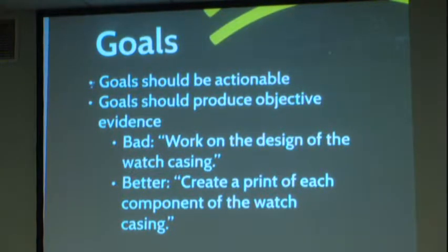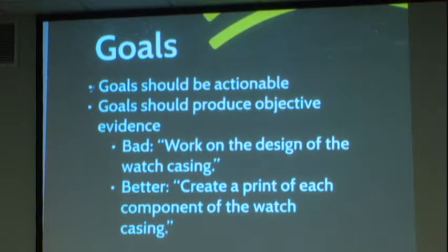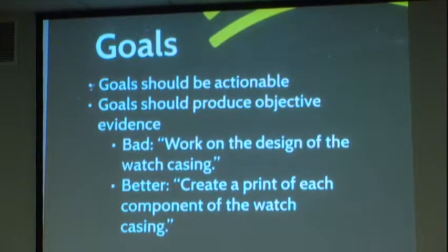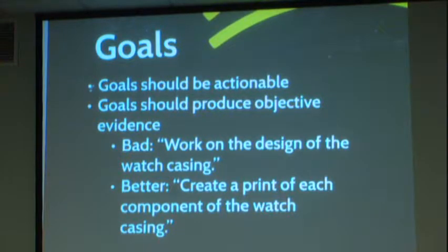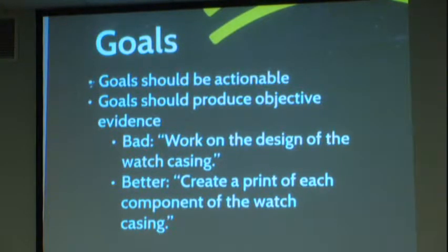It should be specific. And as your advisor or your TA or your team leader, your project manager, I should be able to say, okay, so you were this week going to create a schematic for this. Let me see your schematic. You should hold that up, okay? So if you're the project manager, you should be, before your lab session, asking your team for that objective evidence for their goals, okay? So every piece of the project should have a goal. You should be asking for that objective evidence and presenting it at the beginning of your meeting. So you can sit everybody down and say, okay, here were our goals from last week.